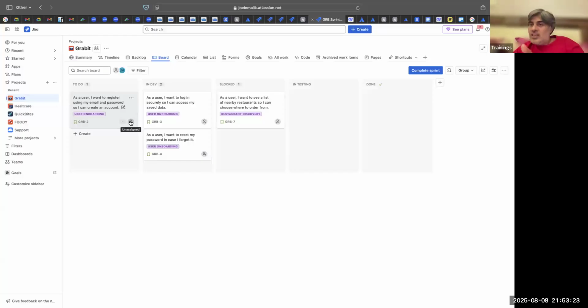So after this DSU, this developer, the PO and the SM connect and discuss whether this guy can start the story, because the original developer may not be available for 3-4 days and we need to start this. As it is, this story is blocked, so we can adjust our plan. These are the things typically discussed in the daily stand-up. You got this? I'll stop for now, then delve further.